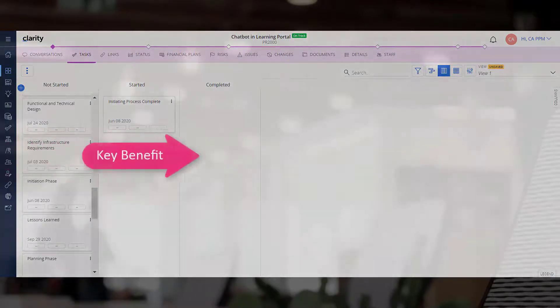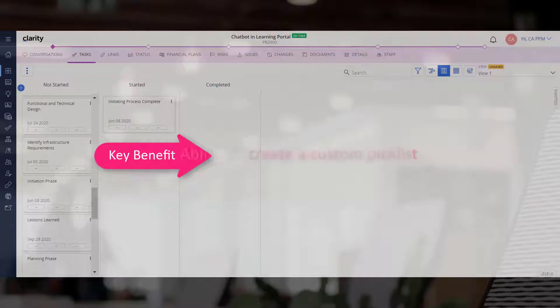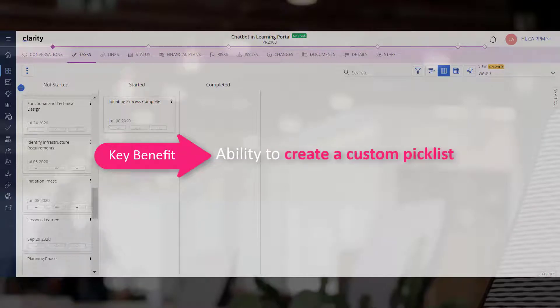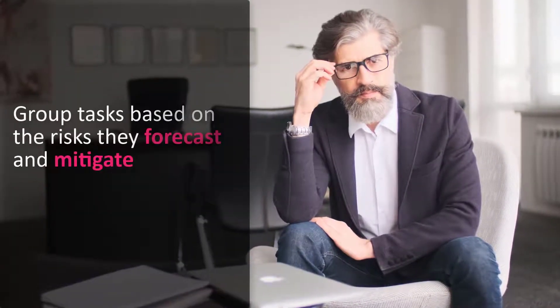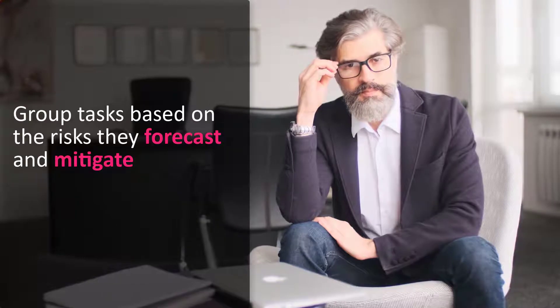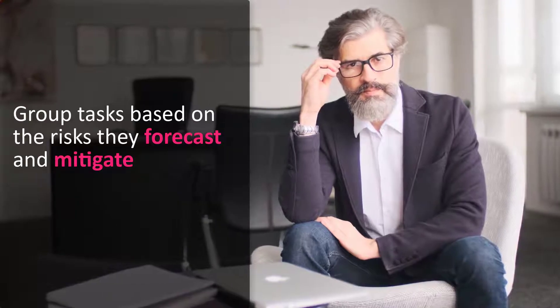A key benefit to using the Board layout is the ability to create a custom picklist. Let's consider a scenario where Project Managers want to group tasks based on the risks they forecast and mitigate.